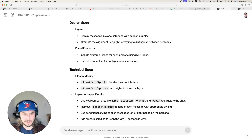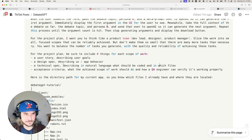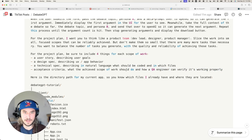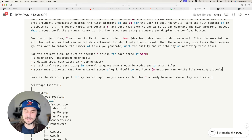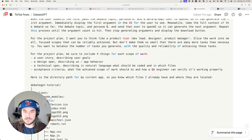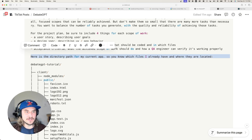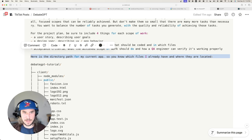That's where you see examples like 'modify this file, render the chat interface' — in natural language, not overly complex, and Cursor understands it and makes it happen. The last thing I'm asking for is acceptance criteria: what the achieved scope of work should do and how a QA engineer can verify it's working. This is helpful for me as I incrementally hand each scope to Cursor — I want quick instructions on how to test it. Last, I provide the directory path for my current app so o1 knows which files exist and where.